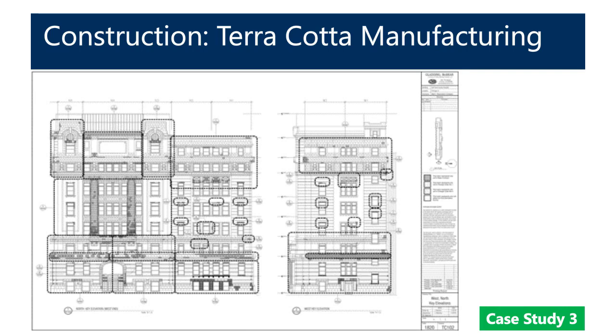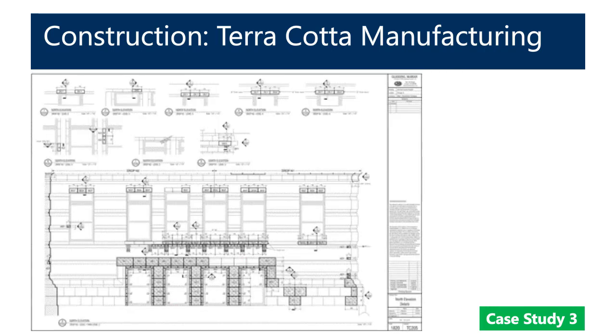So the next step in that process was developing the shop drawings. Ultimately here you see a setting drawing which shows the information that was included in the documentation of replacement from the initial investigation moved into a shop document situation. So looking at that a little bit closer, giving each piece its own identification, and seeing that from how it was moving through the manufacturing process. And this was something that required a lot of review from the entire team, and being able to look at that initial documentation and quickly evaluate made this process move quite smoothly.